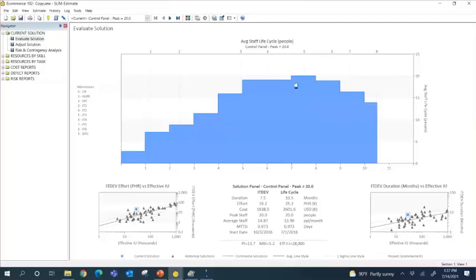This is the staffing profile, and if I look down to the kind of the bottom center, you can see the actual summary of the estimate, which is telling me that this project is going to take about 10 months, 10 and a half months. It's going to cost me about $2.6 million. I'm going to ramp up to 20 people, okay? And I'm going to deliver 28,000 implementation units, which is the sizing unit I'm using right now. It's called an implementation unit, okay?